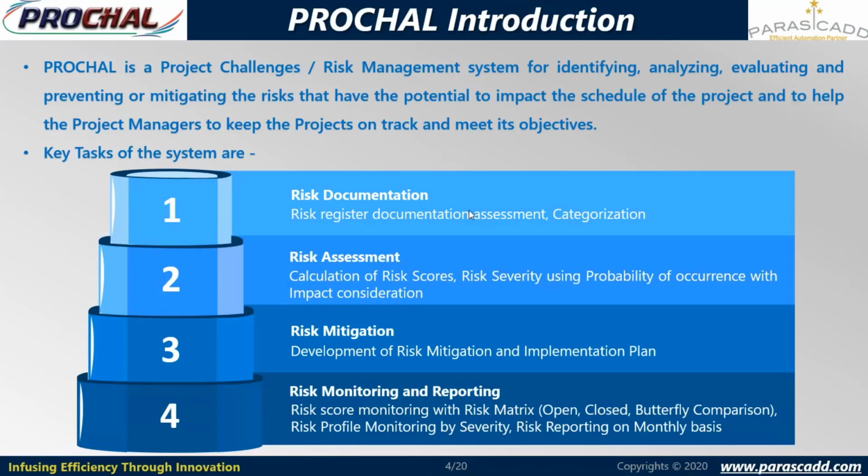In risk monitoring and reporting, risk score monitoring with the risk matrix, we are preparing various risk matrices for open and closed risks, and we are preparing a butterfly comparison, that is for standard and actual risk matrix comparison, risk profile monitoring by severity, and risk reporting on a monthly basis.